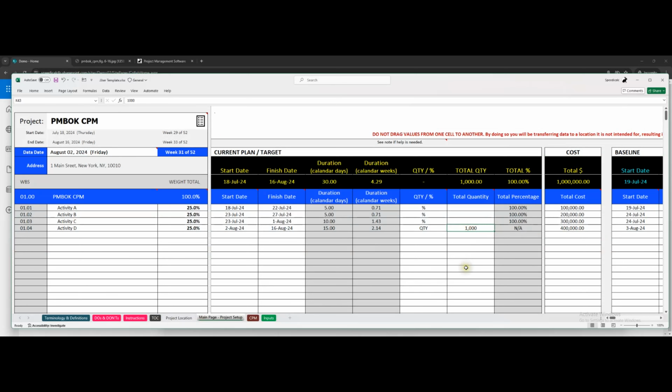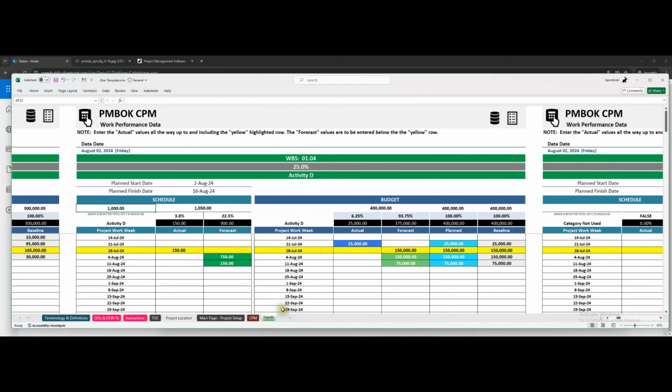So what I would say for the program, for the sake of everything, is this represents what's really happened, right? If you have not gotten an approval for a change order, meaning money or quantity or whatever hasn't been authorized, I would say leave it. Until it's been revised and approved, you shouldn't be changing this. And then when you do get approval, then you can change it. That'll give you the best representation in your charts and schedules, right?